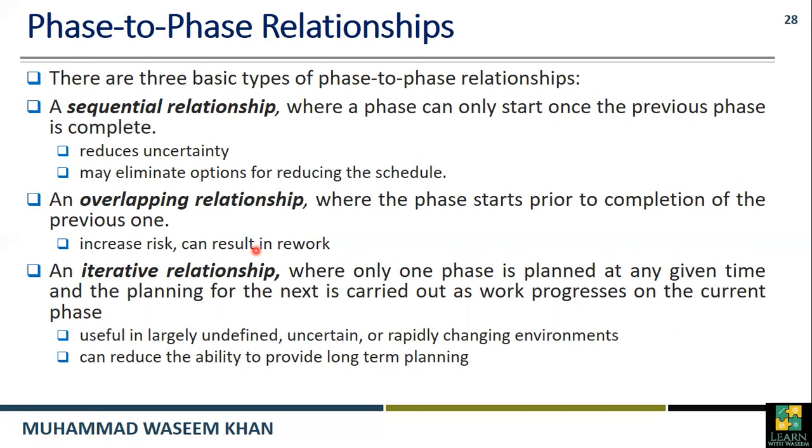Obviously we know that performing the tasks sequentially is very good as compared to the overlapping. Why? Because we complete the first phase, and then we start the next phase, so that becomes very easy for us as well. But sometimes we need to overlap those phases, and we need to do it more carefully because it may increase the risk and it can result in rework.